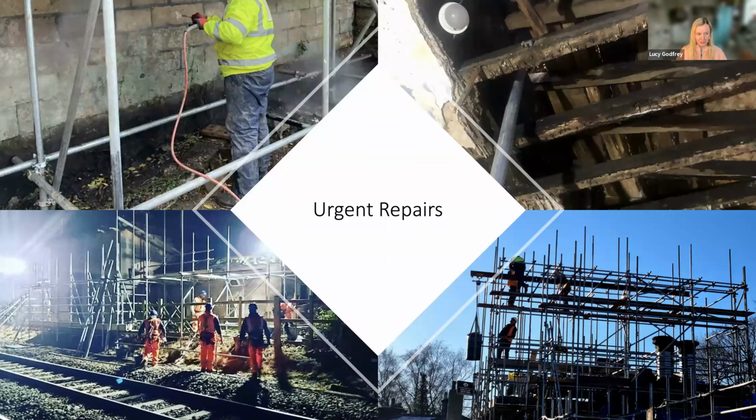So we had a lot of discussions about timings, and we had to give 12 weeks notice, so there was a lot of forward planning when things were quite difficult to forward plan. It was a very costly but necessary exercise, and thankfully everything went to plan on both the erection of the scaffolding and when it was taken down.